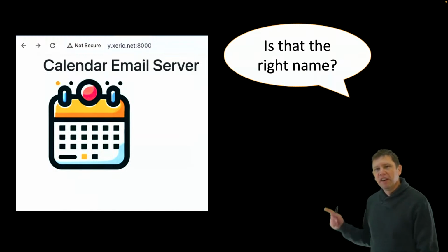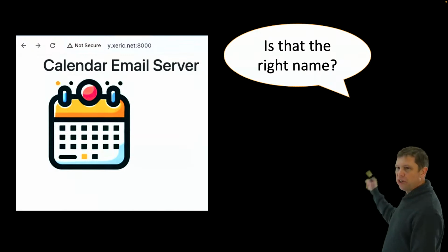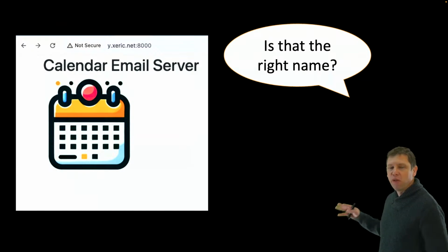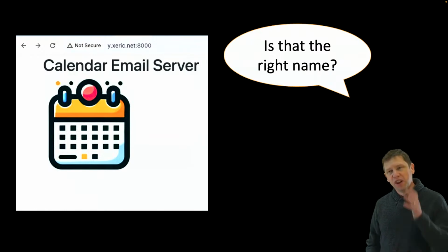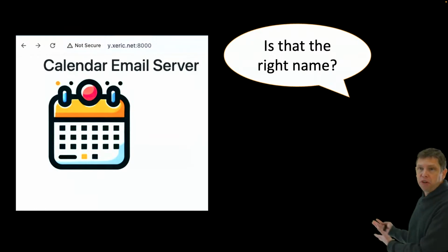And this may sound silly, but on most of the teams I've worked with, when we start off with saying, let's just put the application name in it, this is the question that gets asked. We start on this application and then discover that we don't even know what the application is supposed to be called, which is fine because we're discovering early on. So if we get this story all the way through, we'll at least solve the issue of knowing what to call the application. But it also means we've solved the issue of being able to deploy this.